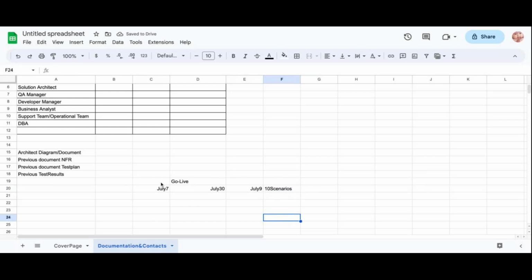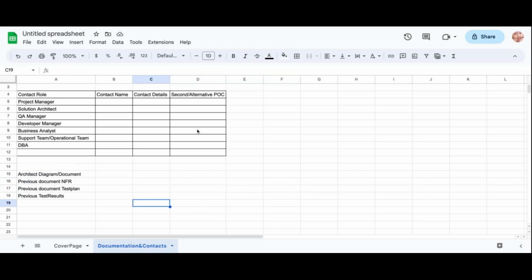So before that, you have to ask these questions: when is the go live date, and when we are targeting the first test executions. First, try to collect that. Then, based on scenarios, we can decide whether we are able to do it or not. So these type of questions you have to ask in the NFR meeting. Okay, it's very important. The first meeting will be an NFR meeting to understand the requirement. There you have to ask these type of questions.